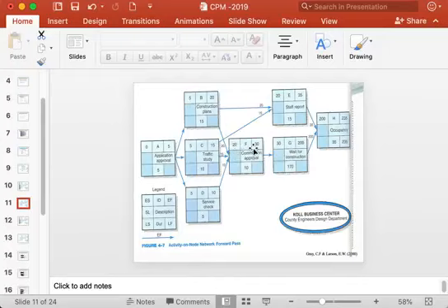So that is why F can start at the earliest after 20 days only. And then again F is going to take its own time to complete, that is 10 days, after having waited for 20 days after starting the project. B has taken 20 days, C has taken 15 days, D has taken 10 days to complete.